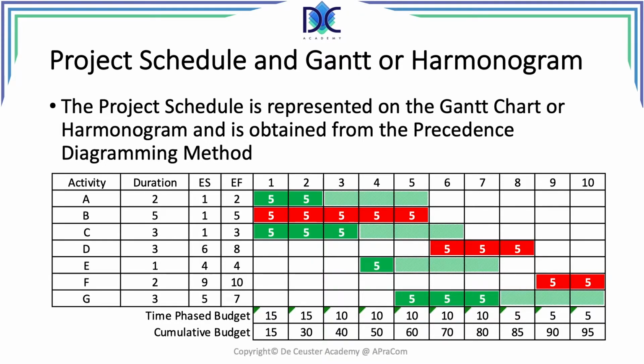So then we move, for example, activity A to a start date 4 and a finish date 5. At that moment, all activities are in their late start and all become critical. It gives us a second budget curve, a second cumulative budget. Now, in order to find the actual or the planned start and finish dates for the activities, we have to see what happens with the resources.